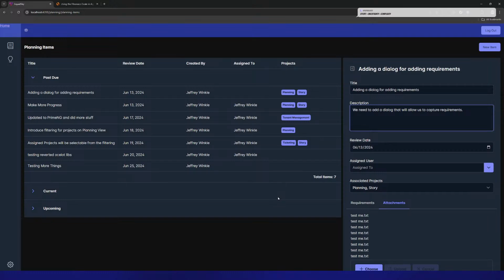So effort plus uncertainty plus complexity, yeah. And the more uncertain you are, the higher you point. You can add, but the more uncertain you are, you should pull that story out and make a spike. So as uncertainty increases, the story becomes less viable.